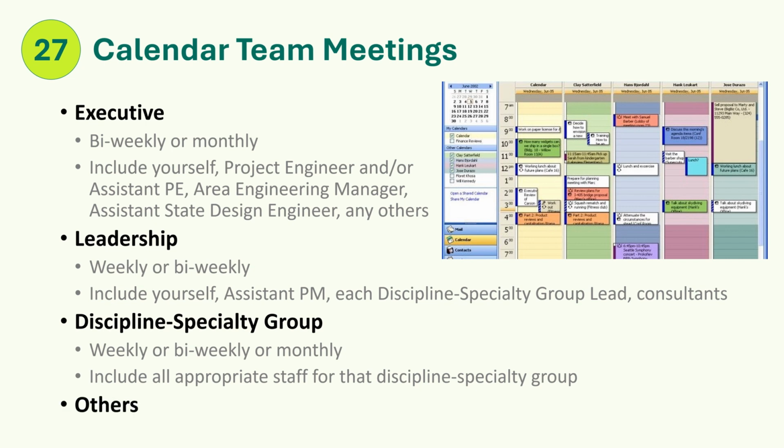Others. There may need to be additional meeting series, one-offs, or specialty meetings during the project life, which you should delegate someone to set up and manage these meetings. It's important to note that meetings are expensive and have a sizable impact to your budget, so keep meetings just long enough to accomplish the meeting goals. Keep each meeting moving at a good pace, end early when you can, keep meeting attendance reasonable, and cancel meetings when they are not needed. If a discussion gets lengthy or off-topic, suggest that this discussion continue at another time so that the current meeting agenda can stay on track.